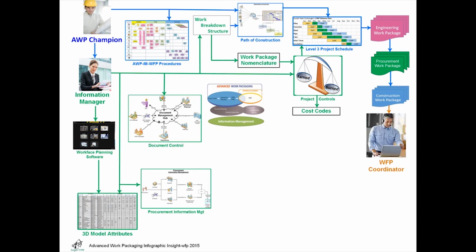Transitioning from information management into workforce planning, it is now time to prepare for the creation of installation work packages and the execution of work. The first and most critical component is a workforce planning coordinator, typically a member of the construction management team appointed by the AWP champion.